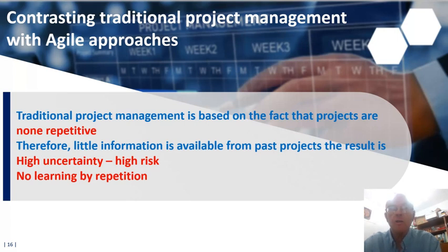Traditional project management is typically less flexible when it comes to accommodating changes during project execution. Changes might require formal change control procedures, while agile embraces changes and actively encourages them throughout the project. Changes can be incorporated during iterations based on evolving requirements.